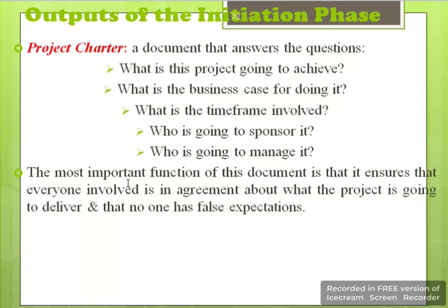Outputs of the initiation phase are: project charter/project brief/project initiation document, PID, a document that answers the questions: what is this project going to achieve? What is the business case for doing it? What is the time frame involved? Who is going to sponsor it? Who is going to manage it? It defines and outlines the expectations of the project.